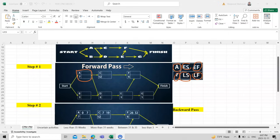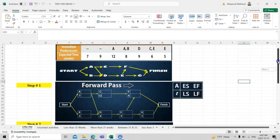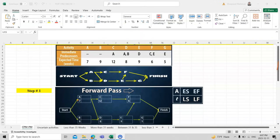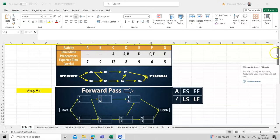The time durations for each task are: A = 7 weeks, B = 9 weeks, C = 12 weeks, D = 8 weeks, E = 9 weeks, F = 6 weeks, and G = 5 weeks. This is how we combine all the values into the chart boxes.